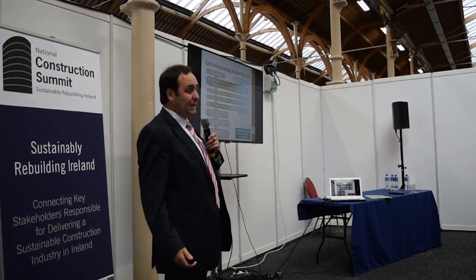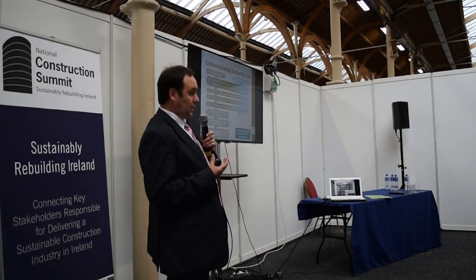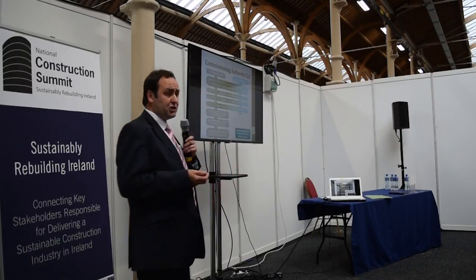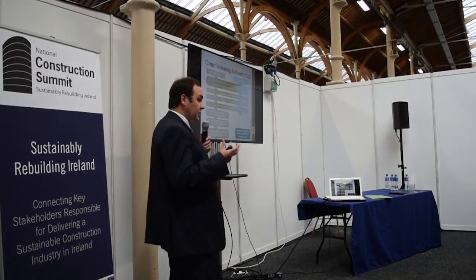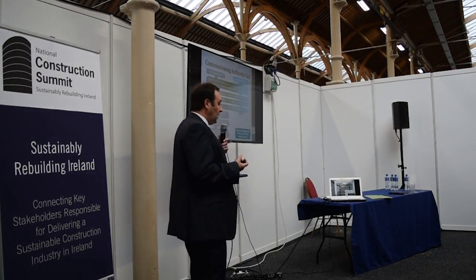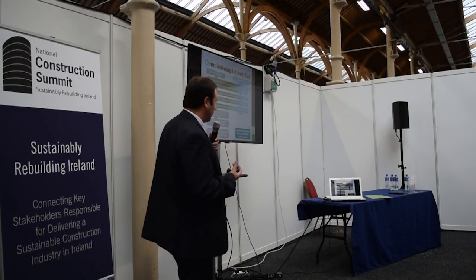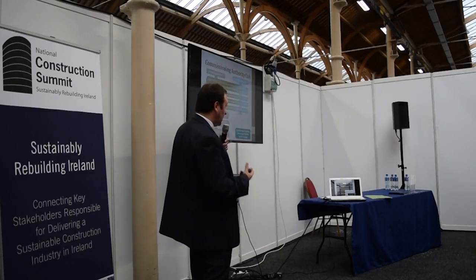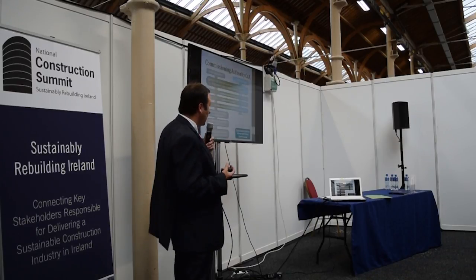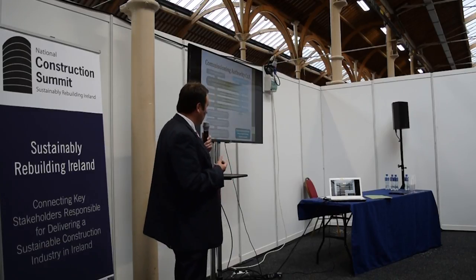So who can actually be a commissioning authority for LEED? There's no specific accreditation. The closest LEED have come is the commissioning process management professional accreditation from LEED, but it's not actually a prerequisite. So once you have documented experience of 2 similar projects, right from conception of the commissioning process, right from the design stage through to 10 months of occupation, you can actually qualify. It can be a qualified employee of the actual owner themselves, an independent consultant, or an independent subcontractor.